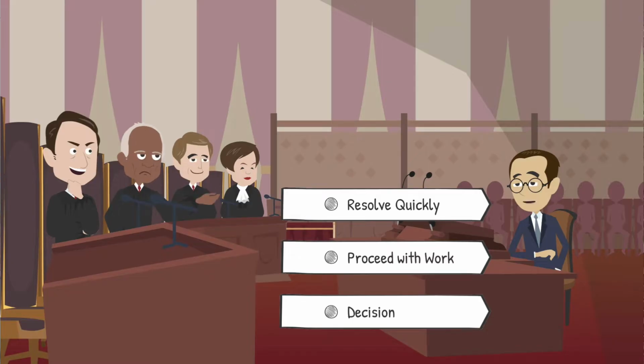going to the courts is more time consuming. In the spirit of mutual trust and cooperation, and in the spirit of getting things moving, so that projects don't get stuck and the work gets finished, within your same NEC contract there will always be an element which can be brought in under adjudication, which should be able to resolve any of the issues quickly. So that is brought in through the New Engineering Contract, which is the adjudicator's contract, right?